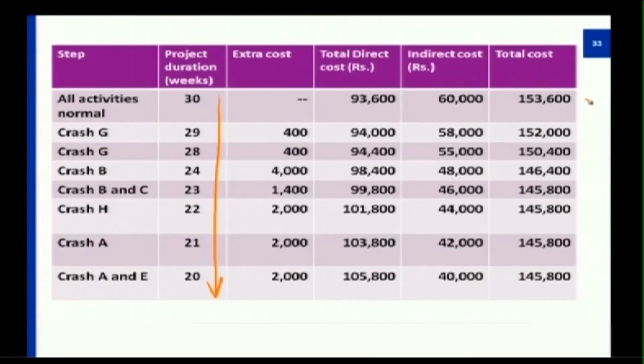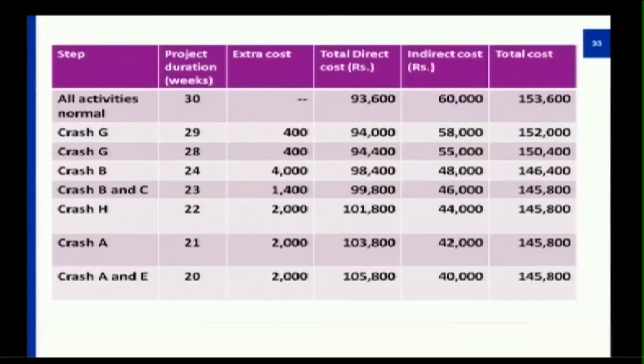But then when I look at the cost, until 23 weeks the cost got reduced meagerly, whereas after 23 weeks, any reductions from 23 to 20, the cost remains the same. So at that juncture, for beneficial purposes from the developer's end, the developer would give them a sufficient feel that the project can be reduced from 30 to 23 weeks at the maximum.